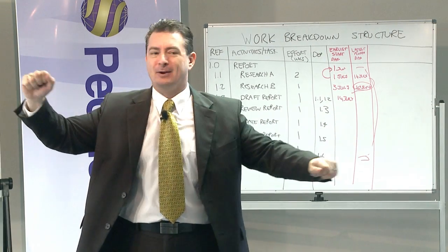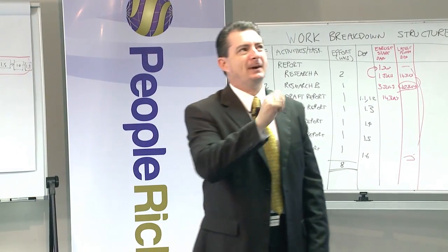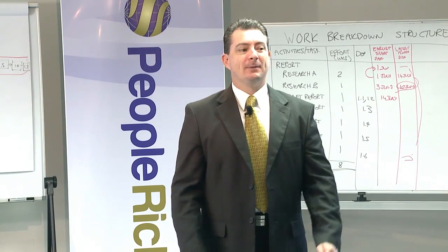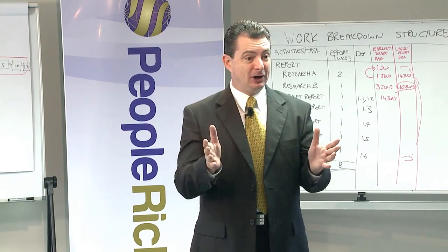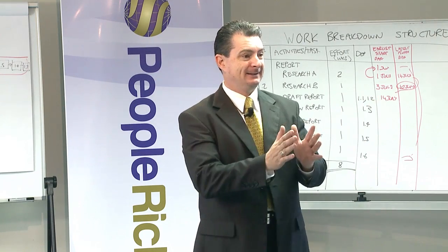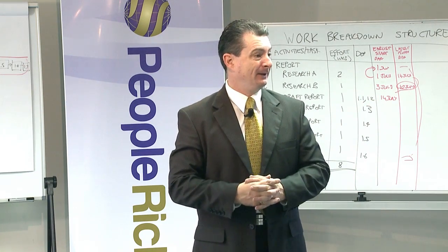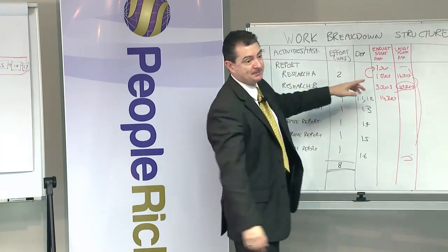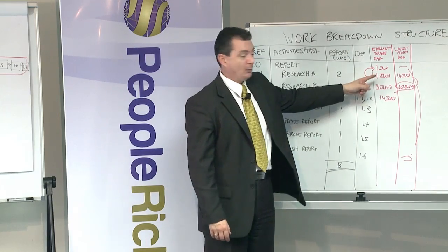Like, I remember we got a quote for one gig years ago. One said 180,000, the other one said 20,000. Where was the issue? Well, the issue was how we wrote up the scope. Because one was interpreting it as this, one was interpreting it as this. So there must have been some ambiguity. Would you agree? Excellent.